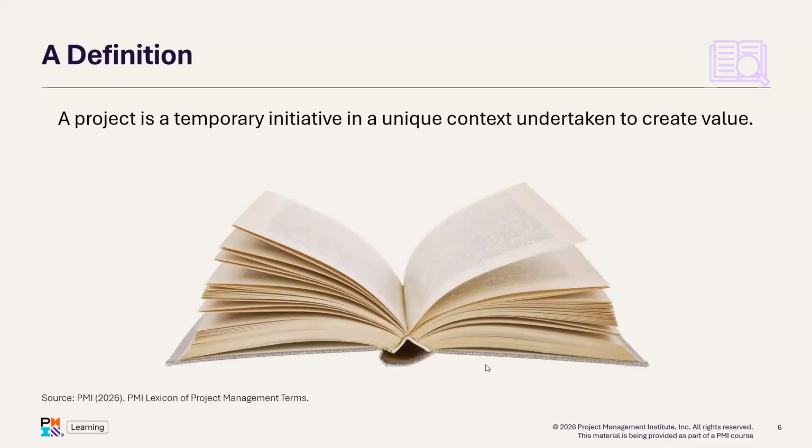Fafa, what makes a project temporary? It is temporary because it has a lifespan. And when you say lifespan, how do you mean? I mean, before the project is done, you should know when you started and when you should end it. Right. So temporary means that it has a definite start and definite end. If you are handling something you call a project and it doesn't have a definite start and a definite end, you probably are not handling a project. You're probably working on operations.